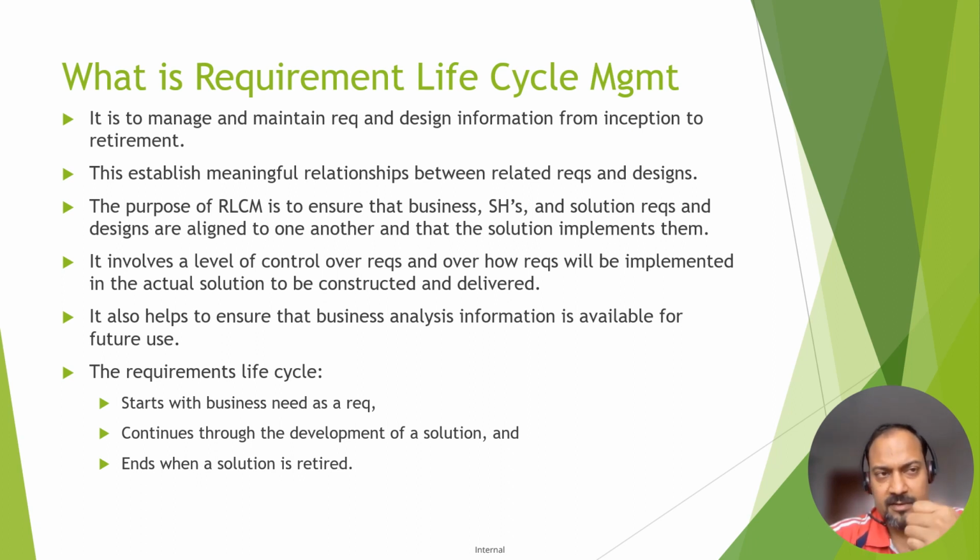So when the requirement is being created in a management tool, you are not creating only one requirement. There are a lot of requirements that you are creating, and one requirement could have a relationship with another requirement, whether that requirement is dependent on another, or another is dependent on it, or there is a derived relationship, where initially that was a business requirement, and then further that is translated to a solution requirement or transition requirement.